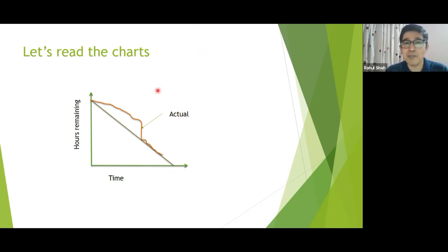Very good. All valid scenarios, and that is how we get insights from this chart. One of the reasons could be the team was doing poorly, and then they said, okay, we are moving one or two stories out of scope for this sprint, and then they are moving fine. So whatever you have all said is very valid.